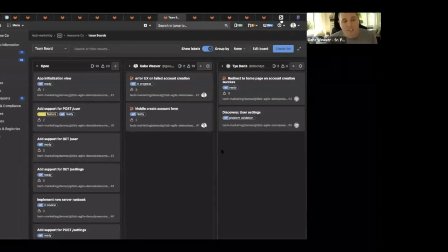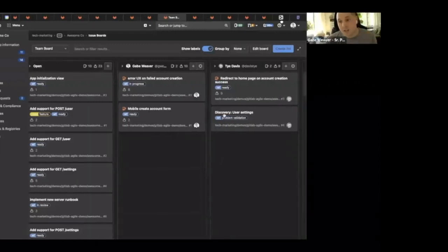With these boards, I can get a nice view and switch between context during the release cycle, whether I want to see what my team is working on, what each person is working on, or what is happening in our current iteration. If I need to do longer term planning across different iterations, I can do that. If I need to think about my monthly release planning, I go to that board. So I've created a board for each specific task that I need to do throughout the month.